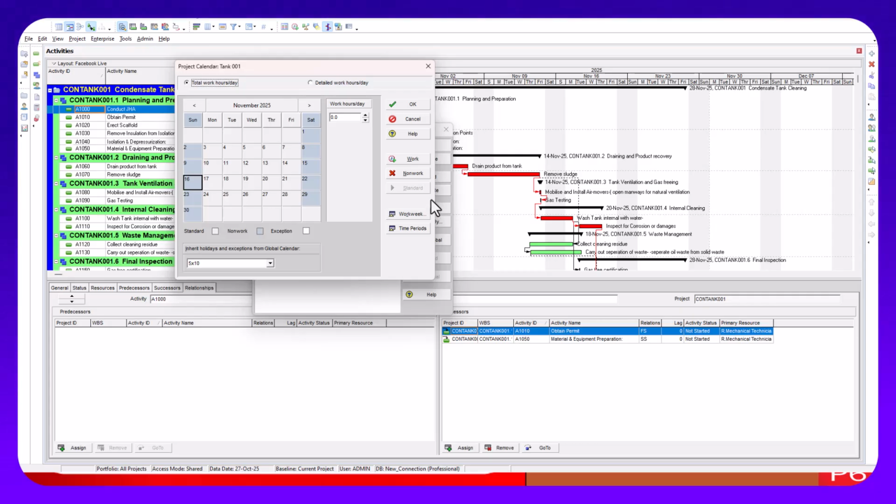In modify, we're going to be looking at our work days. We want to define our work days. On this project, we want to make our work days a 6 day work week. That means we'll be working Monday to Saturday. Sundays will be rest day, as different from the normal default, which is 5 days as work days, then 2 days as your weekends. This information usually comes from your contract document.